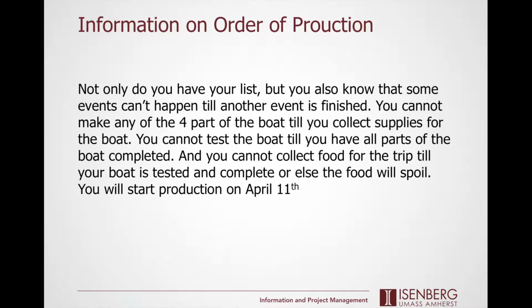Then, if testing goes well, which we hope will be finished in 1 day and won't disrupt our critical path, you need 1 day to collect food, and you can't do it beforehand or else the food will spoil. And you're going to start this production on April 11th.